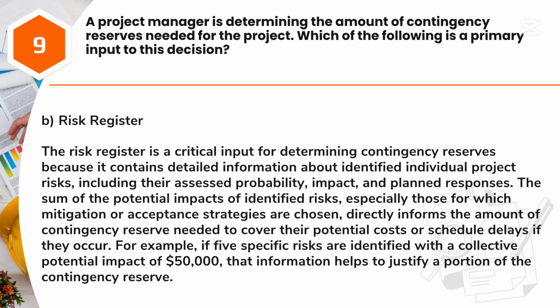Answer: B. Risk register. The risk register is a critical input for determining contingency reserves because it contains detailed information about identified individual project risks, including their assessed probability, impact, and planned responses. The sum of the potential impacts of identified risks, especially those for which mitigation or acceptance strategies are chosen, directly informs the amount of contingency reserve needed to cover their potential costs or schedule delays if they occur.